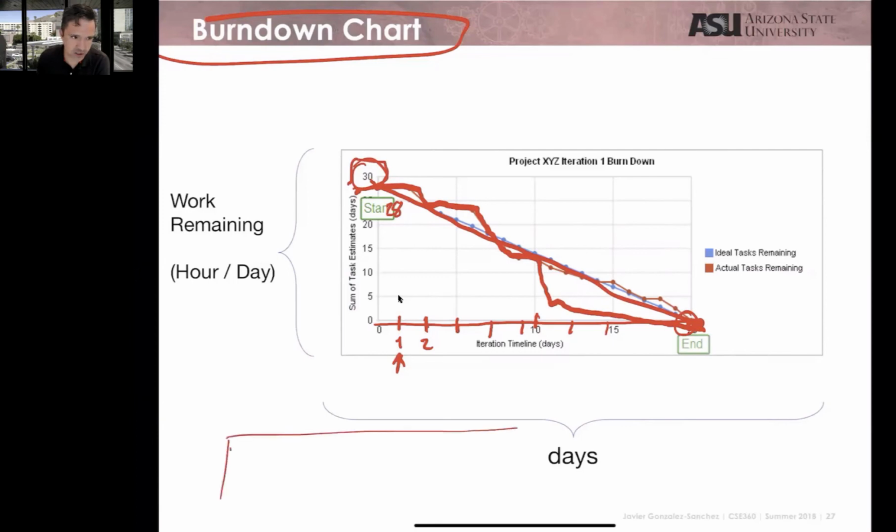I can have a chart that goes from day 1 to 15, if you work during the weekends, representing the first sprint, the first 30 tasks that you select, and then another one that represents sprint 2, with as many tasks as you select for sprint 2, and so on. And that is a graphical representation of what happened with your team.